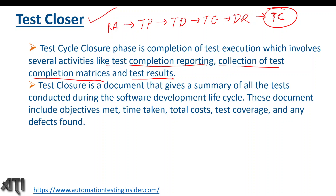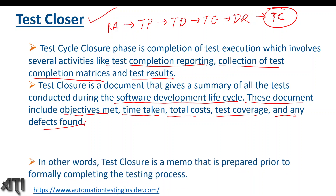Test closure is a document that gives a summary of all the tests conducted during the software development lifecycle. The documents prepared in test closure activities include the test completion report, which covers whether objectives were met, the testing duration, total cost of testing, test coverage, and any defects found.